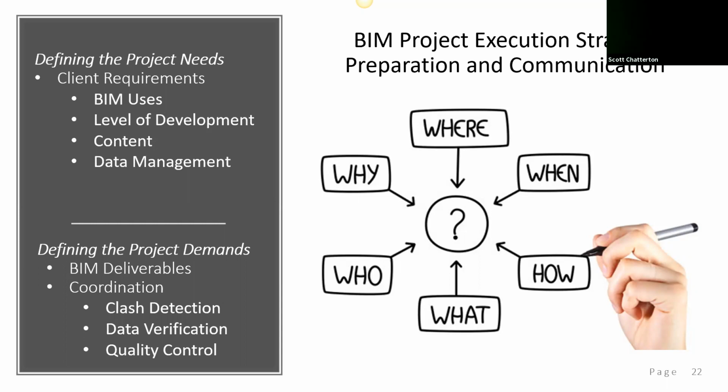Defining the project demands. Not all projects demand a high level of coordination. Not all projects demand a high LOD. An example of one that doesn't is I've done office high-rise, which are basic shell floors with no ceilings. It's all exposed content and everything else.